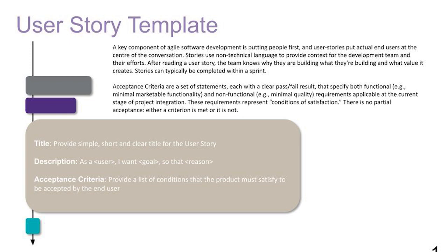So as a homeowner, I want new tile in my bathroom so that I don't have to look at the ugly old tile in there from before. That's the description. That's a user story template in a nutshell right there. As a homeowner, I want new tile in my bathroom so that I don't have to stare at the ugly old tile. And you can already kind of start to picture, what's the old tile kind of look like? What's the new tile look like?